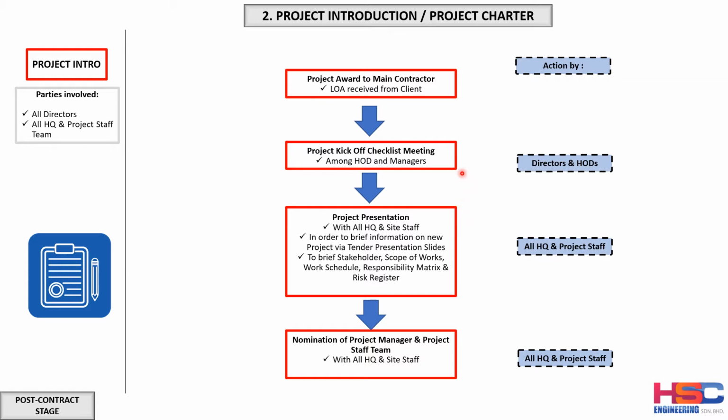It can happen during this project kick-off meeting among the HODs, and then all the HQ staff and the project staff will attend. This project presentation can be separate or can be done together with the second item. During this project presentation, this is the time when all the HQ staff and the site staff who have been selected for the project are briefed on the information on this new project, using the tender presentation slides, or a new presentation slide can be prepared for this.